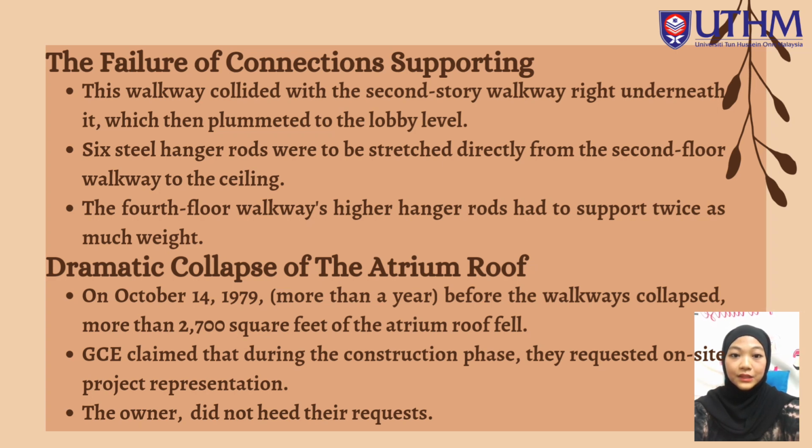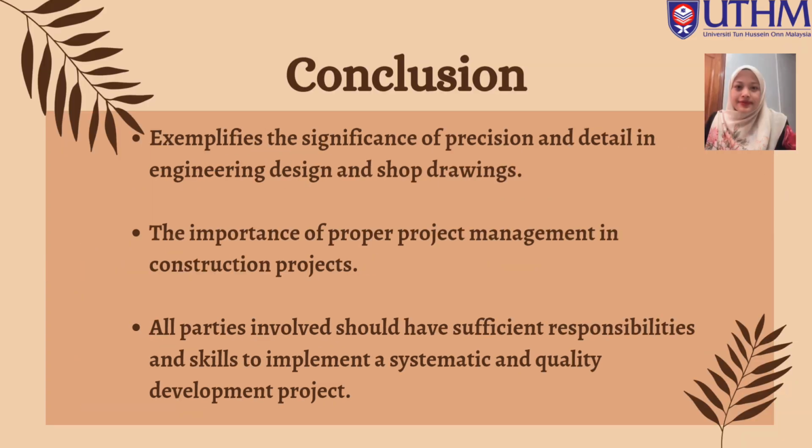Global Consulting Engineering (GCE) claimed that during the construction phase, they requested on-site project representation on 3 separate occasions. However, the owner, Crown Center Redevelopment Corporation, did not heed their request, as doing so would have added to cost.